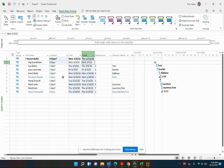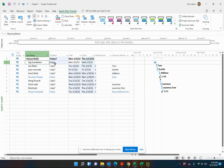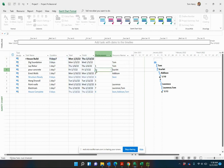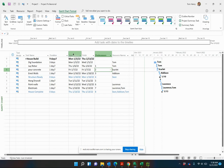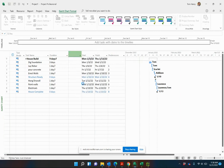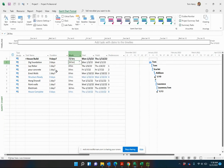What I want to do is show you how to estimate the work. This task, Dig Foundation, goes on for three days. If we assume that one person is working on it, let's say Colum is working on it, that work would be, if he's working full-time, we're talking 21 hours for that. If I right-click on start and insert column, work, 24 hours.